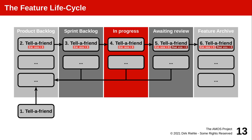Stage one is that a feature barely exists as a blip in the mind of the product owner — the person who writes the requirements in Scrum. Then it gets written down and becomes part of the so-called product backlog; for the first time it's been typed in as a user story. Being in the product backlog means the feature is coming up for planning and implementation eventually, but not yet. It will bubble to the top of the product backlog over time as all other features get implemented. When its time comes, the feature is put into the sprint backlog as a batch of feature requests supposed to be implemented in the upcoming sprint.